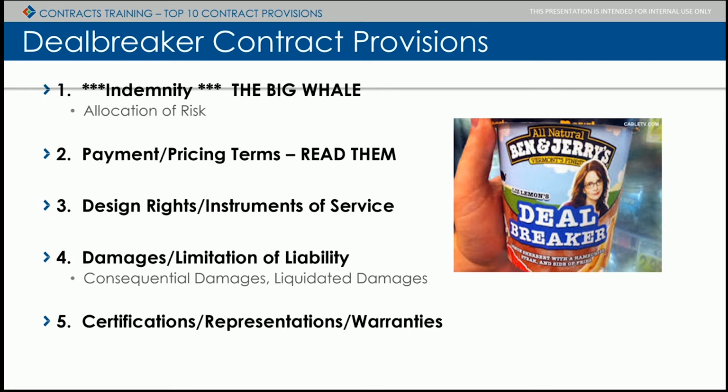And what I mean by that is, do we have the contract with the owner directly? Not usually. We usually have a contract with an architect or another party that's in between us and the owner. And how do those payment terms match what the architect, for instance, has with the owner? My goal is to balance the playing field if we're in a sub position.